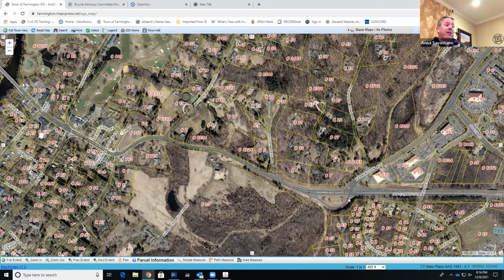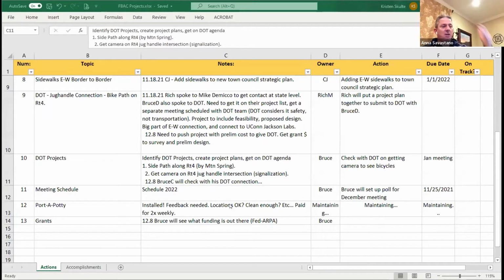Oh, I agree. I think we said that last year. To keep us focused, we need a list. Let's put a list together, and then we could easily move that list up and down. Things get moved around in that list easily enough, but at least we show this is what we need. And then we start hammering at it, like we do as a town. We do a capital improvement project. You're looking 10, 15 years down the road. And then from there, we take it and do these small little things each year. We just nibble at it.